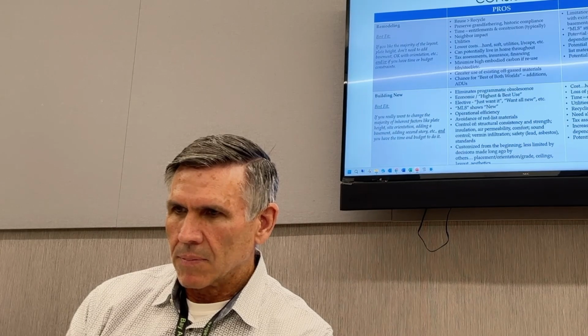So I want to do all the right things, but I also need to have that knowledge to know, okay, yeah, you might be looking at a 10% hike in material, and it might take 3 months longer to do what we're talking about doing because we have to retrofit a remodel. So, sorry, that was a big question.